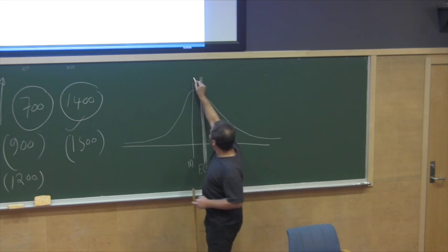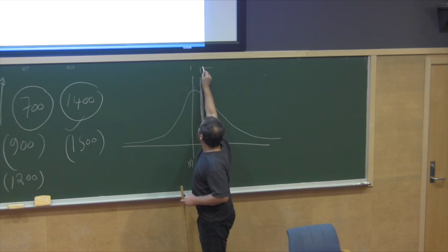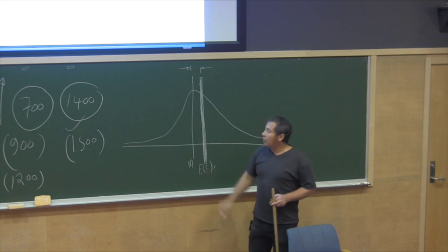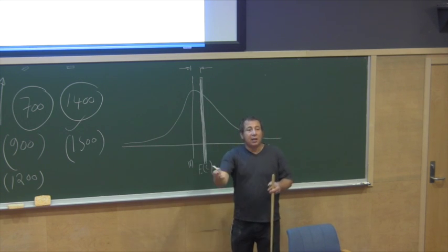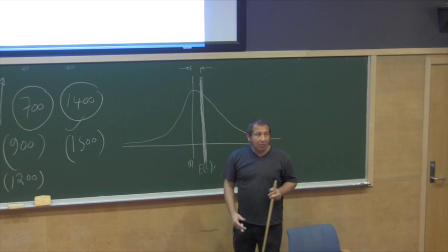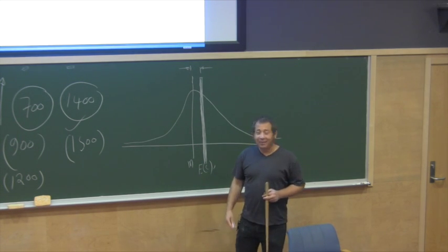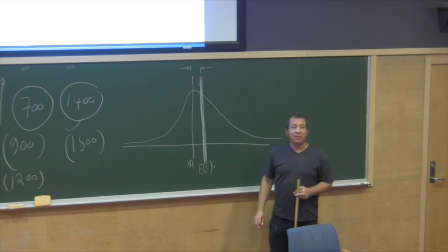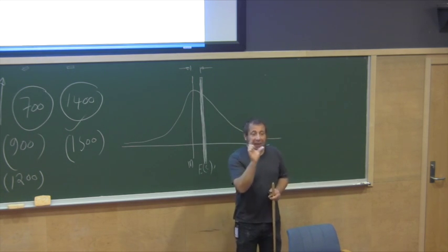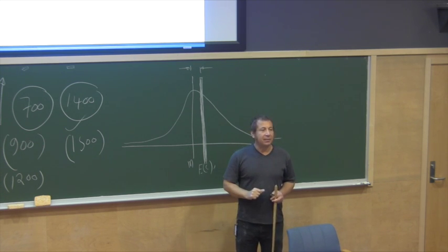And the difference between these 2 values, statistically, defines the task contingency. So if you want to know what should be your task contingency, you add all the most likely costs, and then you calculate the expected values, and the difference between them gives you the task contingency. This is the amount of money you, as a project manager, should have extra.